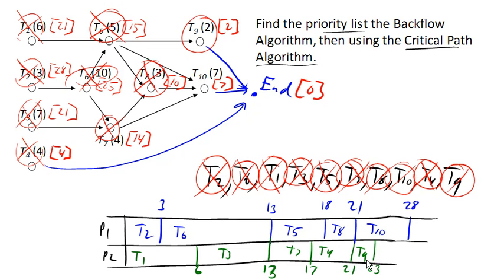And that's not always the case with the critical path algorithm, but it very often does create good results. And we can see why right here. Remember before that task 6 ended up holding up everything. In this case, we got that task 6 done as soon as possible.